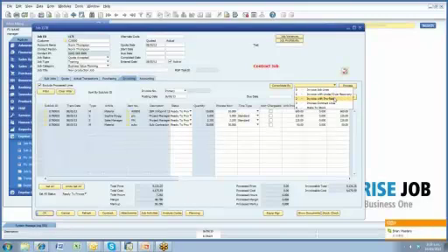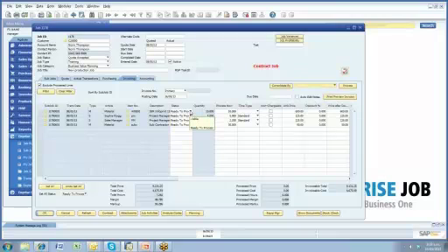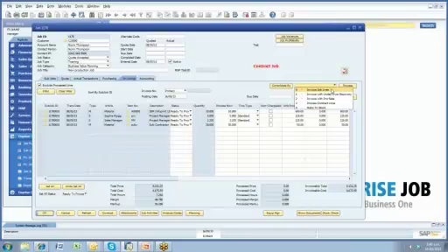I'm not going to go into the screens to show you. I'll just quickly talk about them. Invoicing job lines is your pure time and material kind of invoicing. This is where once I've set the line is ready to process, so it starts out as entered, and then I can set it to ready to process. So my invoice job lines just takes those straight through to invoices. And of course your invoice layout may show every line, or depending on the layout that you've designed, it may show one entry per sub-job, or perhaps it may reflect back to the original quote lines. So you've got all those options.